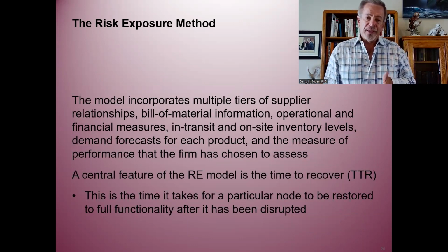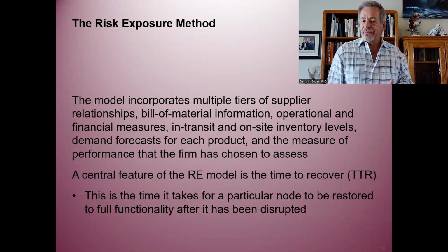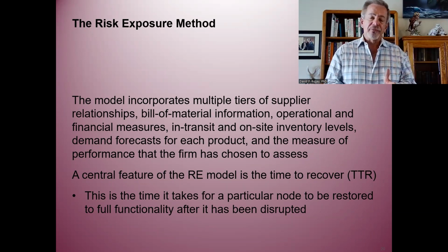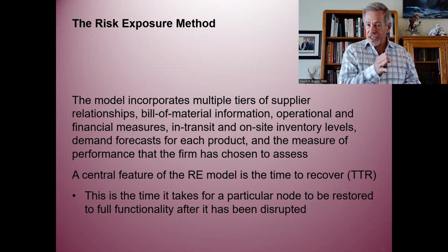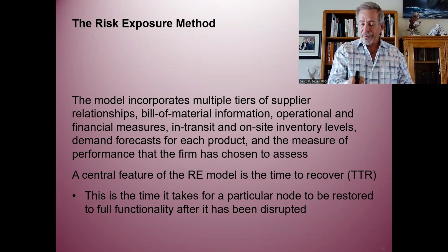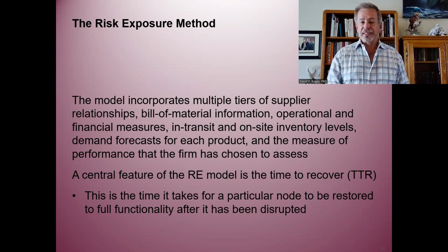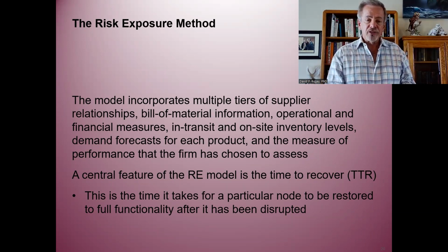So think about the risk exposure method and how tightly woven it is. Take one out and then figure out the TTR, or the time to recover. So on your RE model, figure out the time to recover. What would happen if you had a node and something happened? Take that node out, whichever node that is in the supply chain. What would happen if that was gone for 2 entire weeks? One plant had some type of a disaster. You don't even have to sit down and identify the disaster. It is just gone. So pay attention to what would happen.